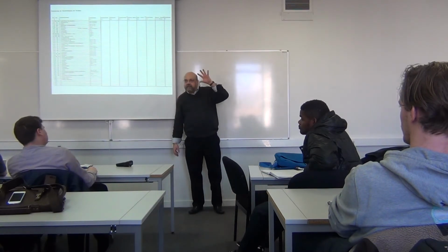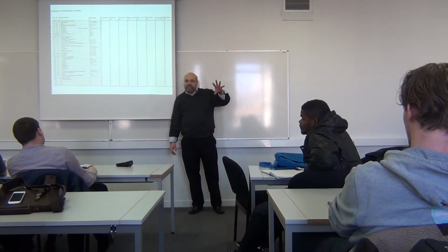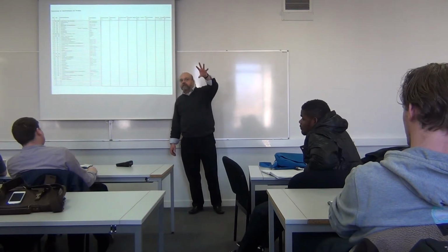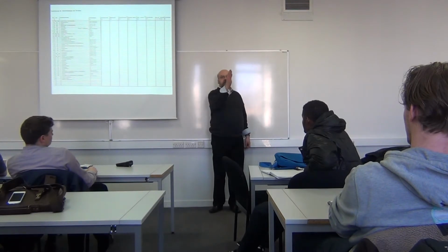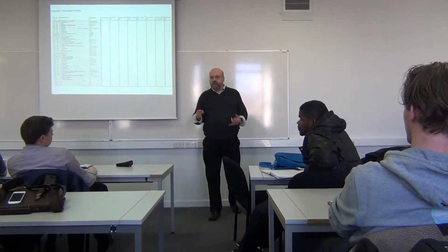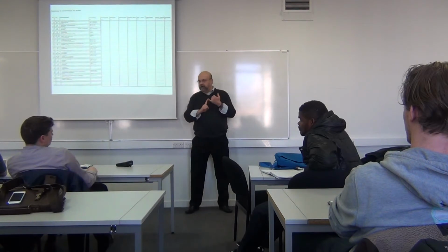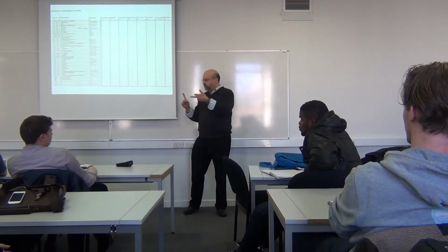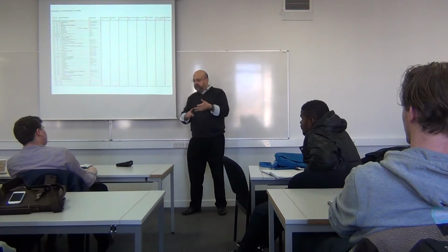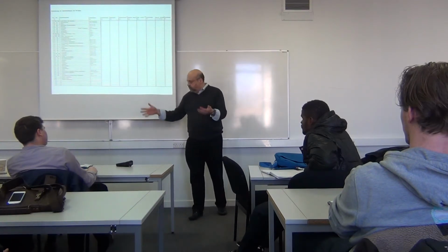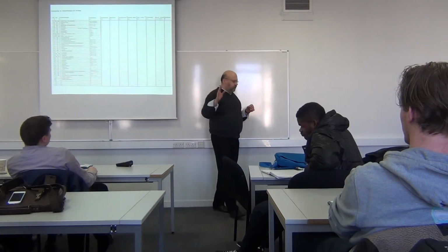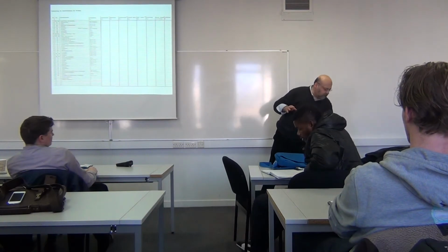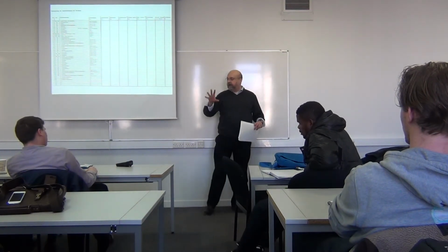Yeah? And it's to be seen differently, it's another thing compared to the scheduling I anyway have to do for the works on site. I anyway have to schedule masonry, I have to schedule facade works, I have to schedule when are the ceiling works, when is the screed, when are the tiles, and so on. That's anyway what I have to do, this bar chart or Gantt chart. I think it was an Englishman anyway. Yeah, so this is for sure. I have to do that anyway.